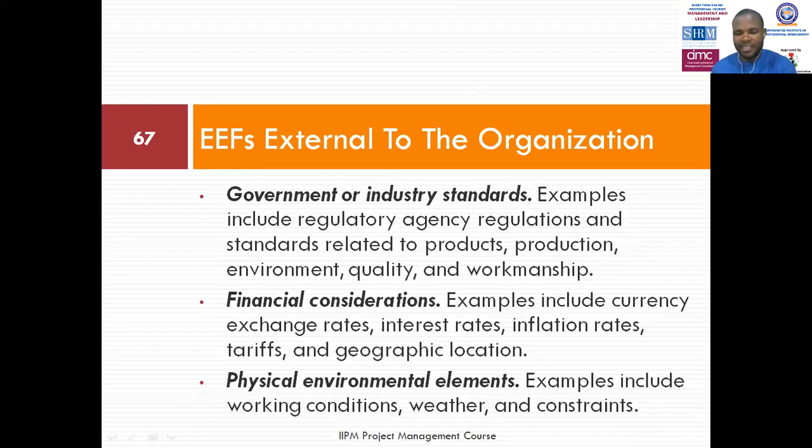There are physical environment elements, which include things like working conditions, weather, and constraints. Now, one of the things we encourage in project management, in the initiation and planning phases, is to do environmental analysis. No matter what, please do environmental analysis. It will not only present to you the environmental impact assessment report, but it will also give you total feasibility on the possible characteristics of the environment you're going to do the project in. If there are observations to be made, assumptions, or risks identified, the environmental analysis will help you put up mitigations before coming in.